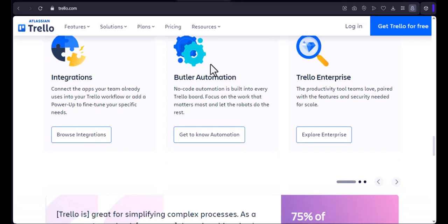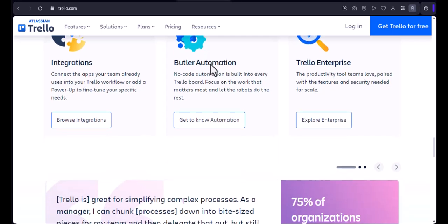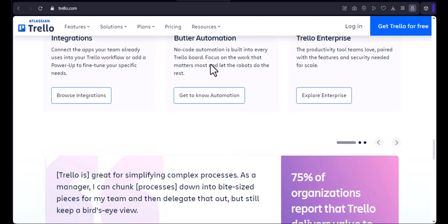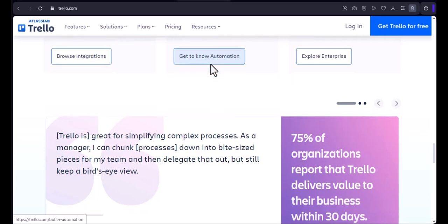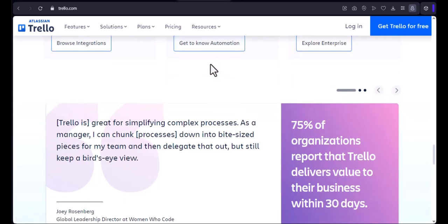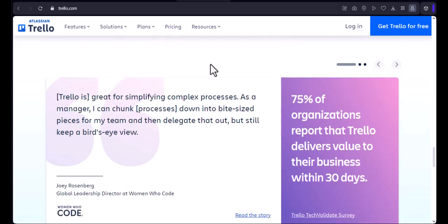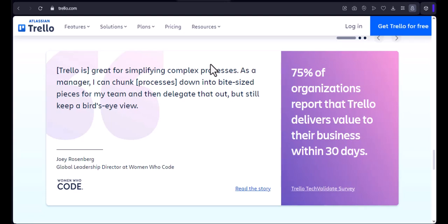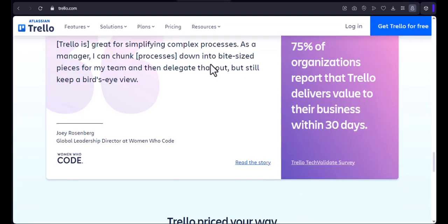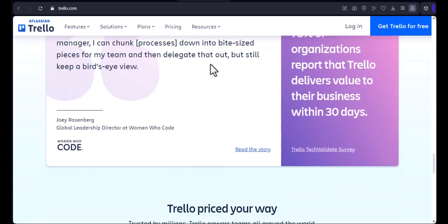For a Kanban team, Kanban focuses on limiting work in progress. You can use Trello to enforce this by using card limits on your in-progress list. When a team member finishes a task, they move the card to the next list, which signals that they are ready to pull a new task from the to-do list. This continuous flow helps identify bottlenecks and keeps the team focused on finishing work.